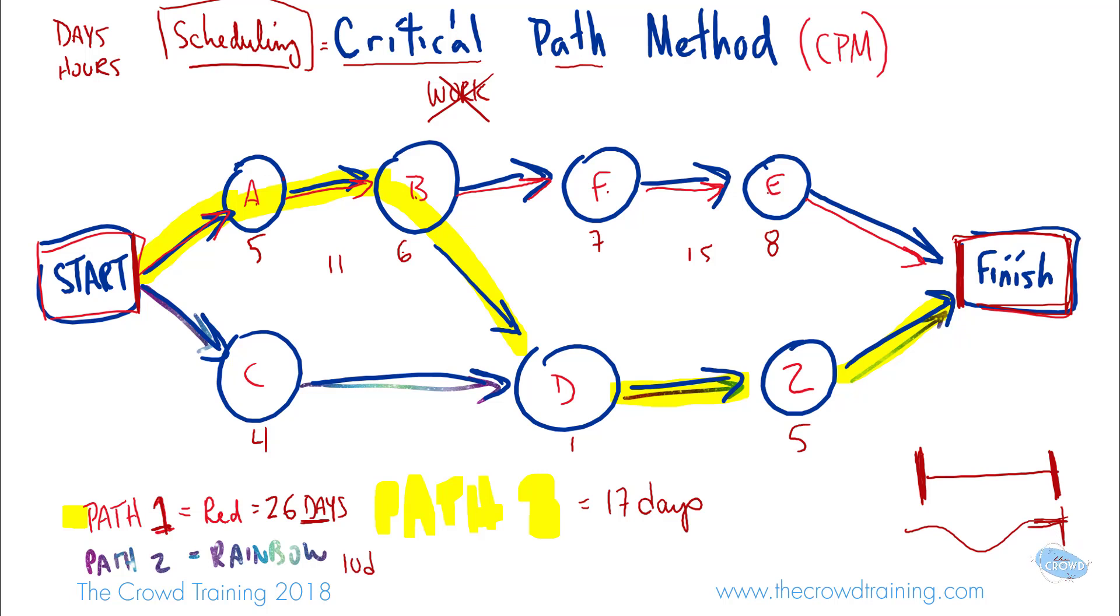So we have to figure out which one is most critical in terms of time considerations. And that, as you see, is the one that's the longest and that would be 26 days. So the critical path then is the longest path in terms of scheduling. And that, in this example, is number one, 26 days.